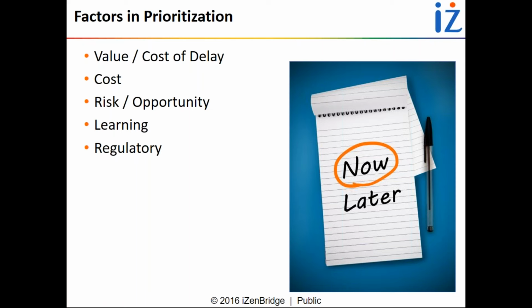And sometimes risk is considered anti-value. It means if there is uncertainty in implementing, producing those capabilities, and you are selecting those requirements to reduce the uncertainties, what will happen? You will get some predictability. You will get a higher level of predictability early in the project. So stakeholders want to consider those requirements which are providing high value and which are taking big risks, because you need to reduce uncertainty early in the project.